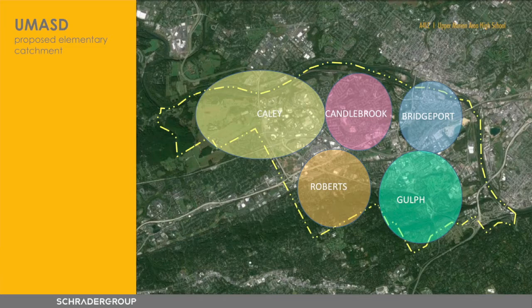build on that site. Cayley was a little bit different in that the kids were going to school on the site, and we built a building right next to the existing building. So that existing building stayed in place, fully functioning, while we built the new facility, and then the students moved over, and then we did demolition. So that process was in place for the district. They'd done it once before, and moving to the high school, that's the process that they'll be using there as well.